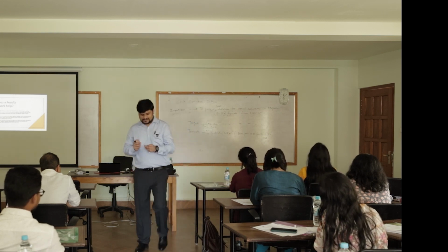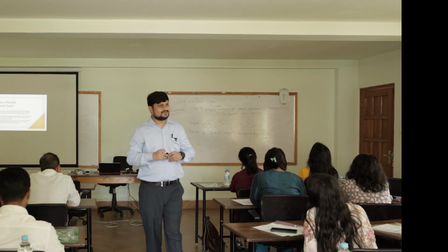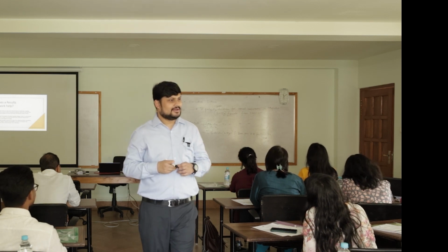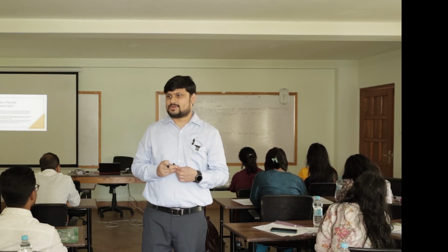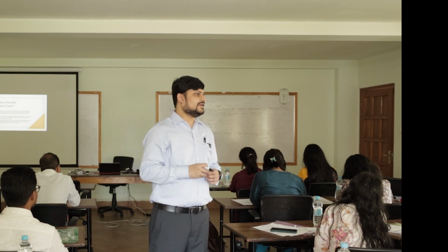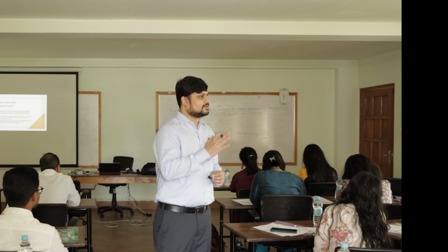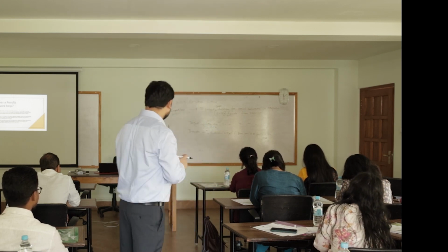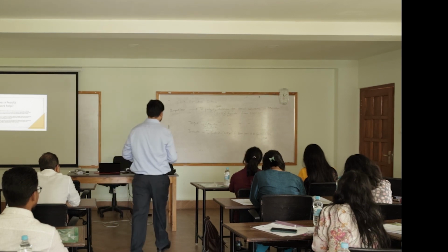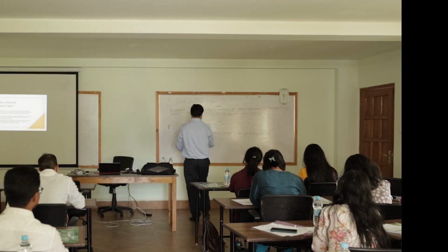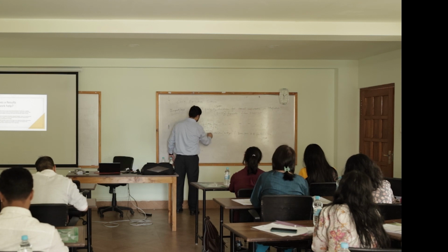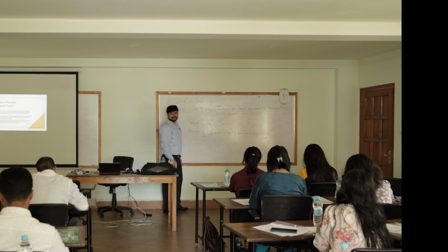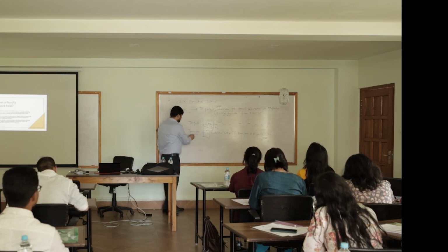Now what is the difference between target and indicator? There's a very, very thin line here. Target has a number to it. Indicator simply says proportion, total numbers, or means of children. This is the only difference between the target and indicator. This becomes an indicator.